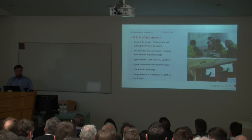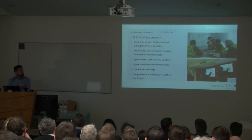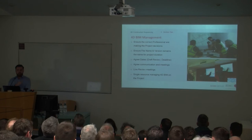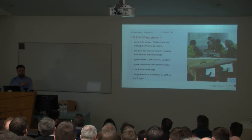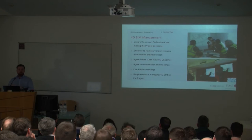The next thing is ensuring the file name and version remains the same for the project duration. I'm not going to go too much into BIM level 2 and file names, but this all ties in to your information and how you're managing your projects. This is key to ensuring that the link between your 3D model and your program stays the same throughout construction. If at some stage your contract manager starts your program, hands it on to a planner, and the planner changes the name on the program,